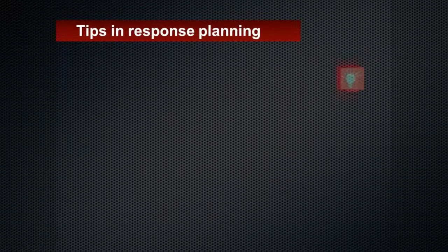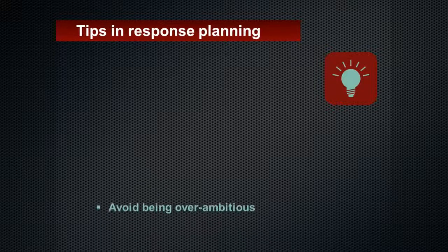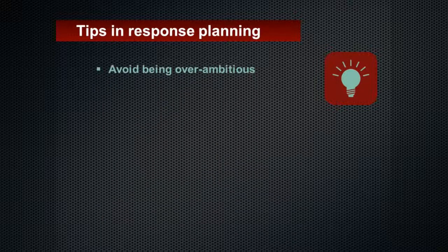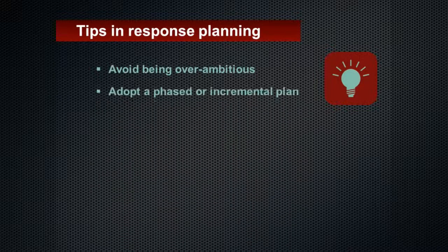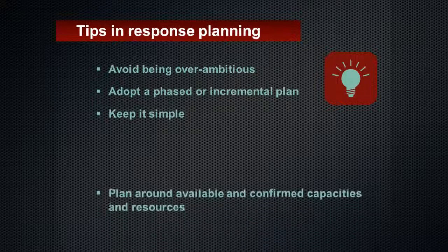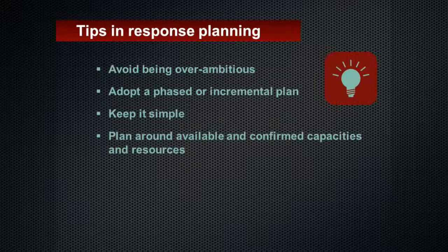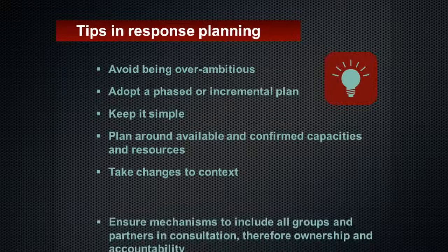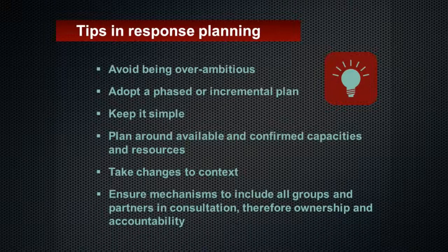Let us share some tips in response planning that a coordinator should always keep in mind whilst developing a response plan. Avoid being overambitious. It's easier to scale up activities over time. Adopt a phased or incremental plan in the immediate response. Keep it simple. Keep priorities and objectives to a minimum. Plan around available and confirmed capacities and resources. Take changes to context and the longer-term perspective into account. Ensure mechanisms to include all groups and partners in consultation, therefore ownership and accountability.